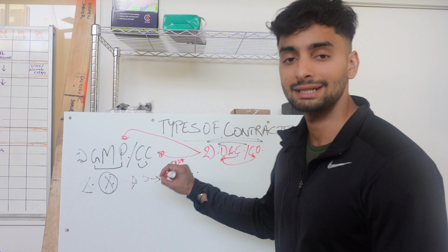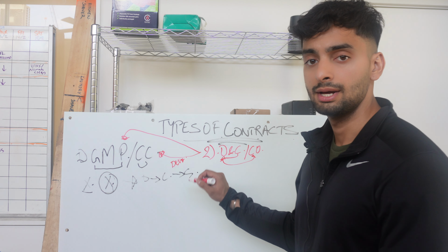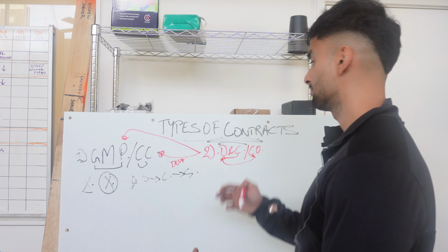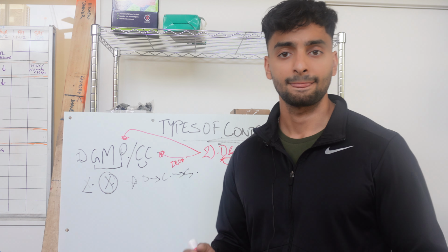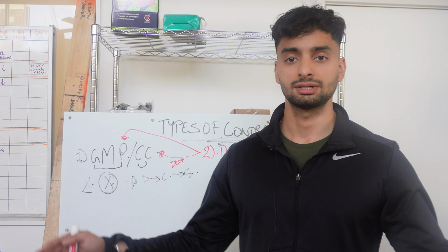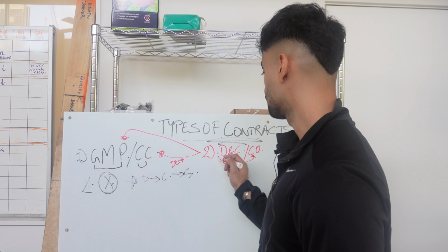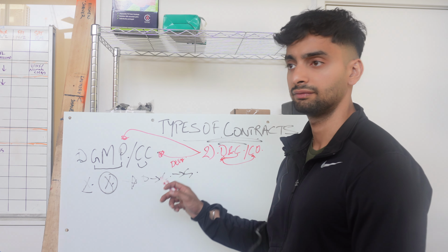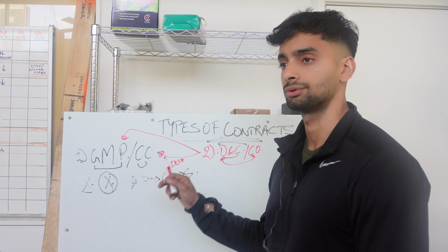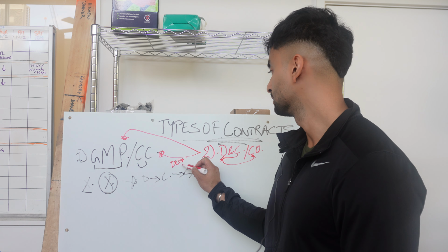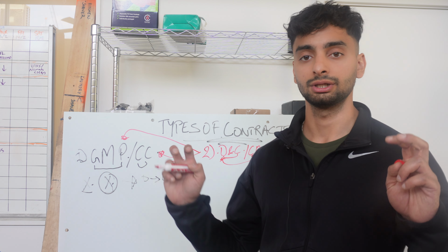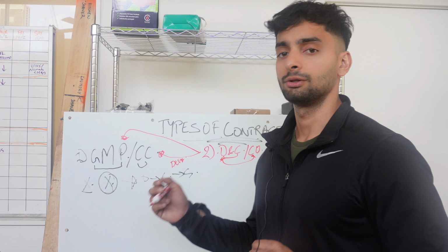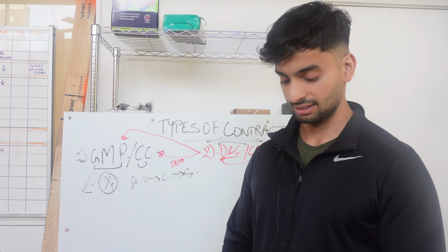Now, there is a risk in the middle over there for the developer: if there are any design details that are missed in this whole scenario, then that cost is essentially borne by the developer. If there are design issues or details missing in the documents of a construction only contract, then the developer has to pay for those costs as a variation.